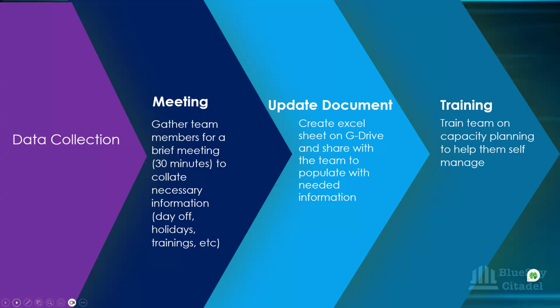For some teams that are advanced, I won't say well advanced, but they've been using it, they're used to it. You just share the Excel documents with them. It could be by the G Drive. It could be that the organization has their own cloud space and all that. You share the documents with them. You give them the right to be able to edit it. So even before you need to calculate, they know the time you normally calculate, because you would have discussed with them to say, okay, by such a time, can you please ensure that you've updated this spreadsheet with your holiday time and all that. And so once they've done that, you don't need to go back to them. That's the one you just open, notice everybody's holiday, and use that to do the capacity that you need to do.